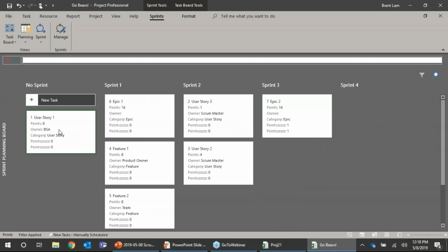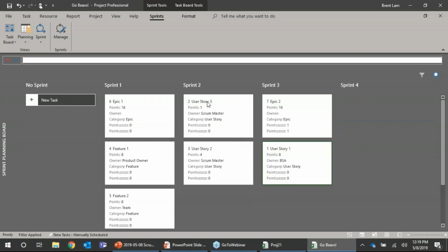Now, some teams or some people will be adamant against doing any planning beyond the current sprint that they're in. They'll say, hey, the product owner or whoever's responsible for the backlog may update the priorities, or the results of the current sprint may affect what actually goes in there. And that's all true. Just as long as you understand that whatever you put in sprint 2, 3, 4, et cetera, isn't set in stone, but what it does give you is that deliverable roadmap.